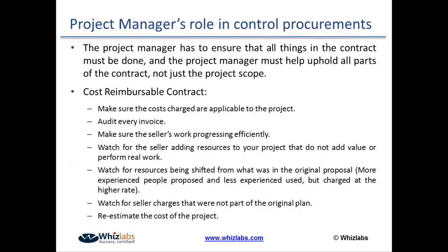Cost reimbursable contract: the project manager needs to make sure that the costs which are charged are applicable to the project. Audit every invoice, make sure the seller's work is progressing efficiently. Watch out for the seller adding resources that don't add value to your project. Watch out for resources being shifted from what was originally decided. Watch out for the seller's charges that were not part of the original plan. Re-estimate the cost of the project whenever possible.